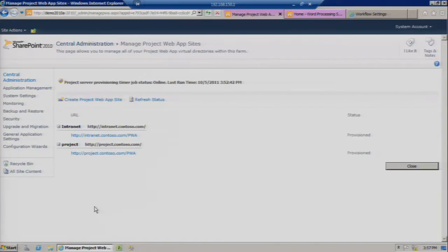In R&D, you don't look so much at capacity because you're not in the service business. Whereas in IT, in the service business, you really care every day about having enough people to maintain my SharePoint farm while I'm goofing off in Anaheim. So it really depends. But as soon as you partition and you do different instances, then suddenly you can't make those cross-company decisions.